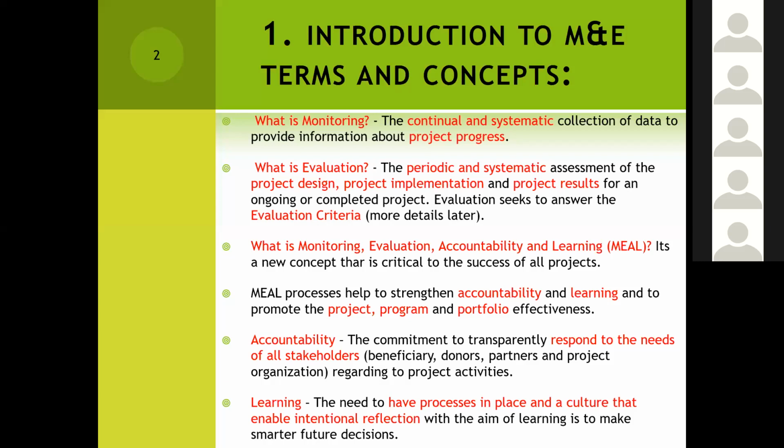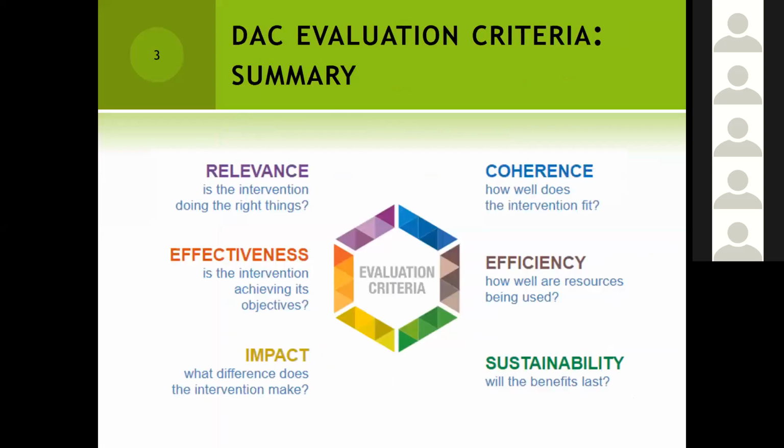Now, as I said, I was going to review the DAC evaluation criteria components as a summary. We used to have five, as I mentioned earlier: relevance, effectiveness, efficiency, impact, and sustainability. And recently, I think just one year ago, the DAC committee provided the coherence component as something we are also able to review.